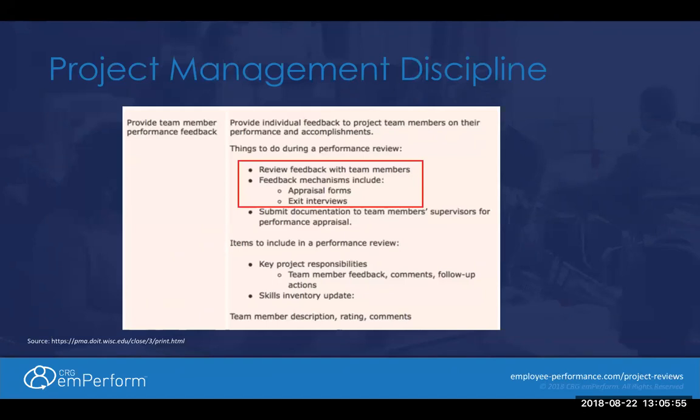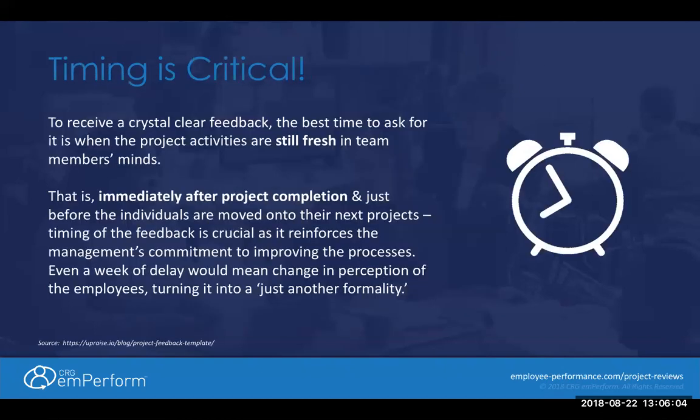Again, focusing in on that close step. Of course, there's other things that happen in the close step that relate to overall project management, but let's zoom right in there on appraisal forms. So when do we do this? Well, timing's critical, and it's clear that the best opportunity to understand the project and the contributions and the lessons learned is to do it immediately after the project completes. You know, we've got people that say within a few days of the project ending, within a few weeks, but the time is important.